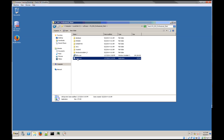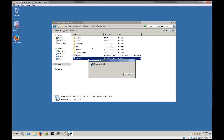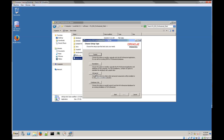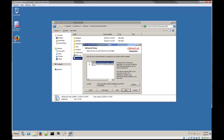I'm going to launch the installer through SetupXn. This will check if the environment has the prerequisites installed. These are the HTML, .NET Framework, Java, and Windows Installer. On my system they're already installed, but if they weren't, the installer would install them automatically and then launch the P6 Pro MSI. I'm going to go with an advanced install because I'm using a 64-bit version of Windows, and I want to install it in a location without the x86 brackets. This path is known to cause certain issues when connecting to the database if the brackets are included.